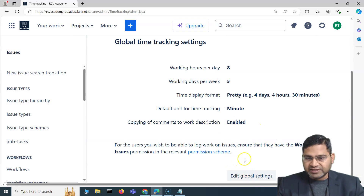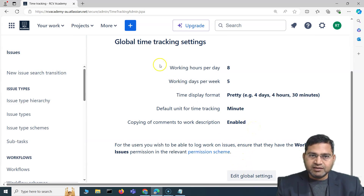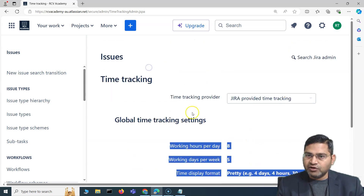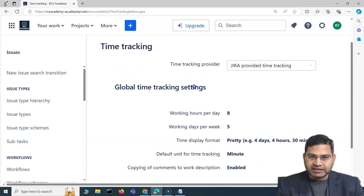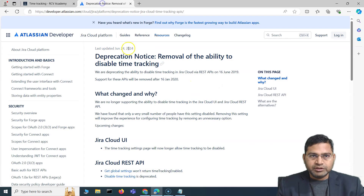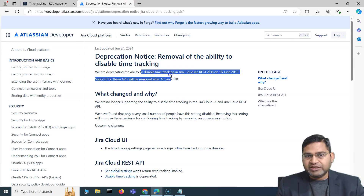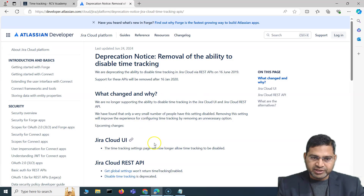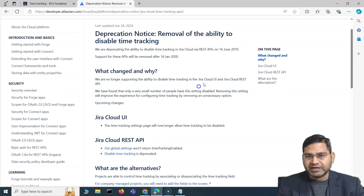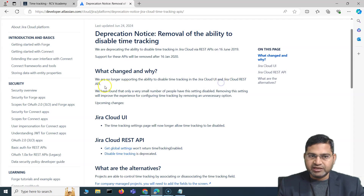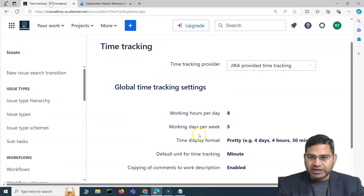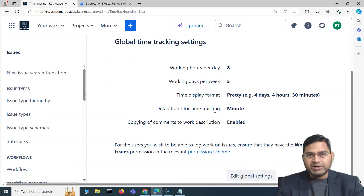Recently, Jira has disabled the global setting that allowed you to disable time tracking altogether. By default it will be enabled, and as a Jira admin you won't be able to disable it. There is a deprecation notice updated on 24 June stating that the ability to disable time tracking in the Jira Cloud UI and via REST API is no longer supported.